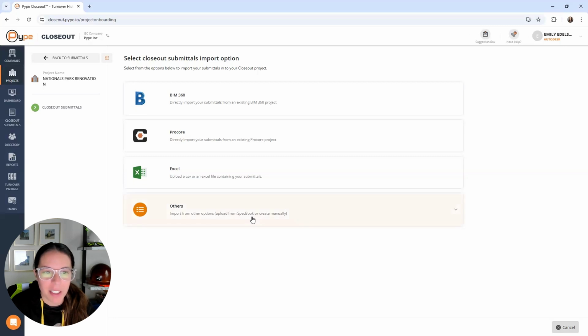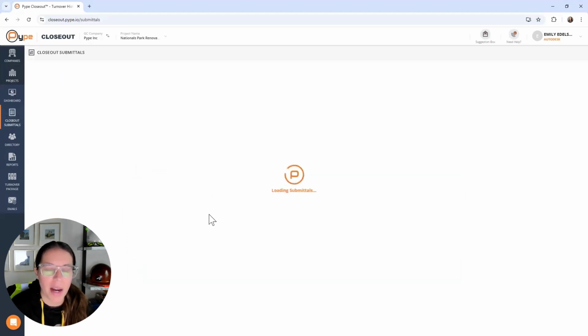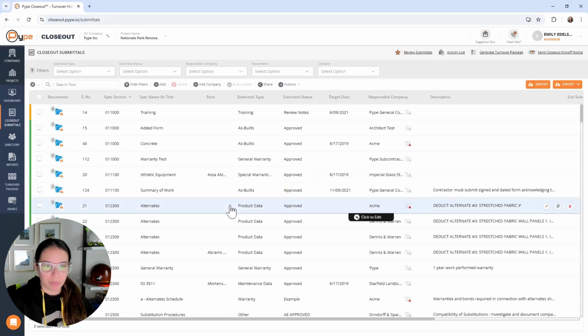So if I come in here into the others, I can actually upload a full spec book, and then it's going to break down all of the different submittal items for me, similar to the AutoSpecs product if you have heard or seen the video on AutoSpecs. So it'll pull out all of those warranty items for me, all of that great information.